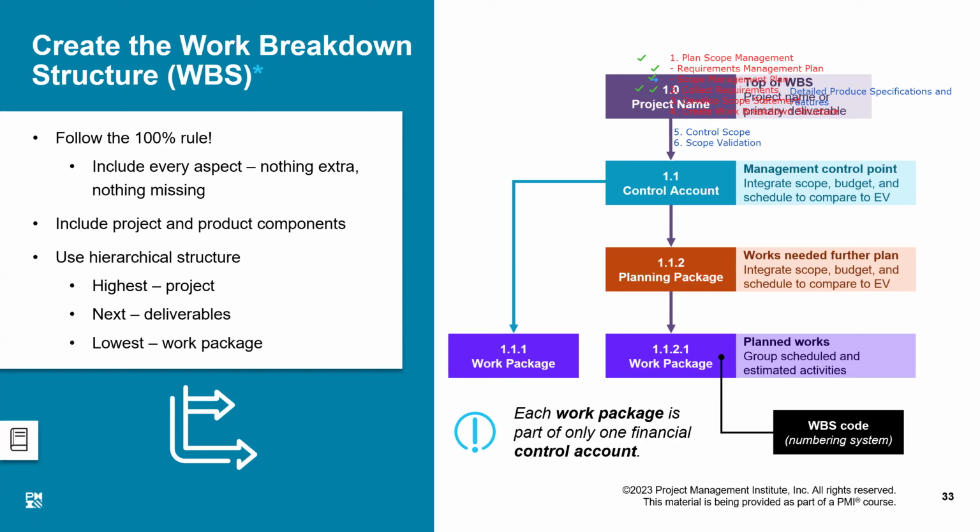Once phase one is complete, you will explore phase two and so on. That is a strategic level concept, a top level concept. The rolling wave planning is the bottom level concept. It is a tactical concept: opening up the black boxes when data is available, and then breaking them down into work packages. That means your WBS is still open for further breakdown.